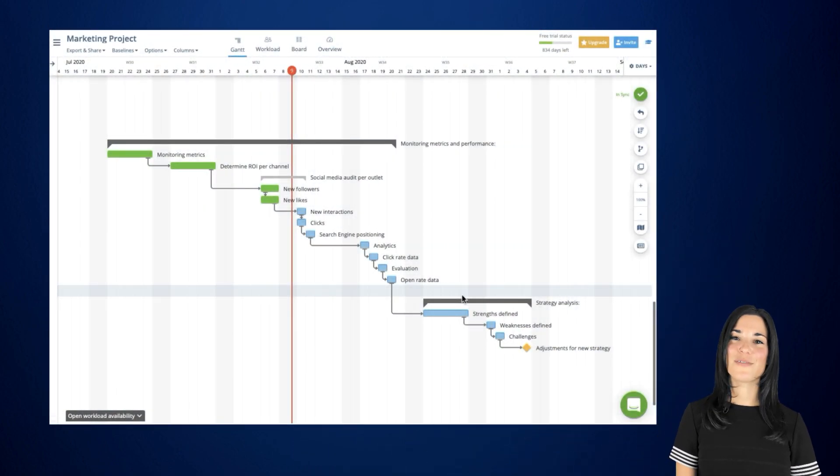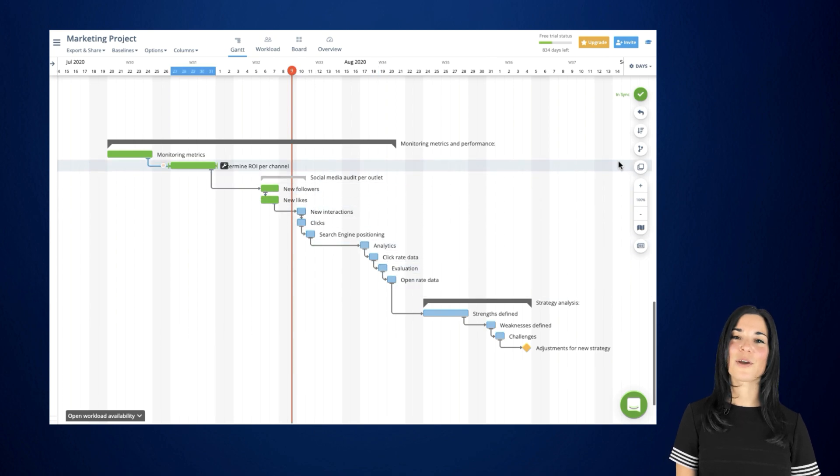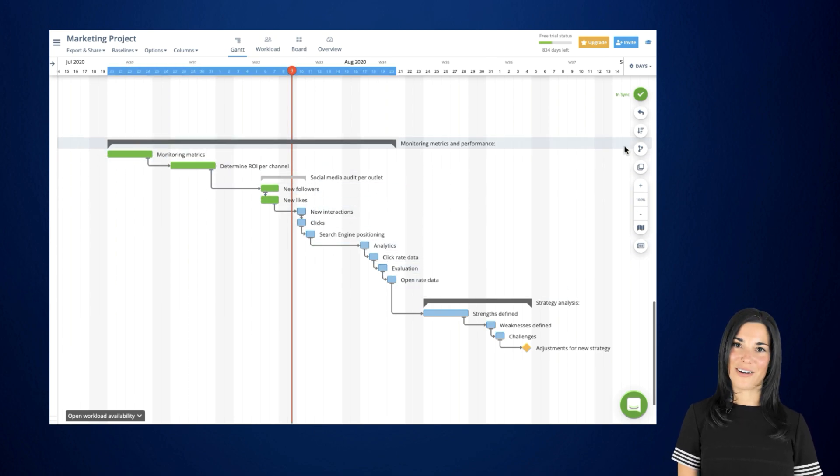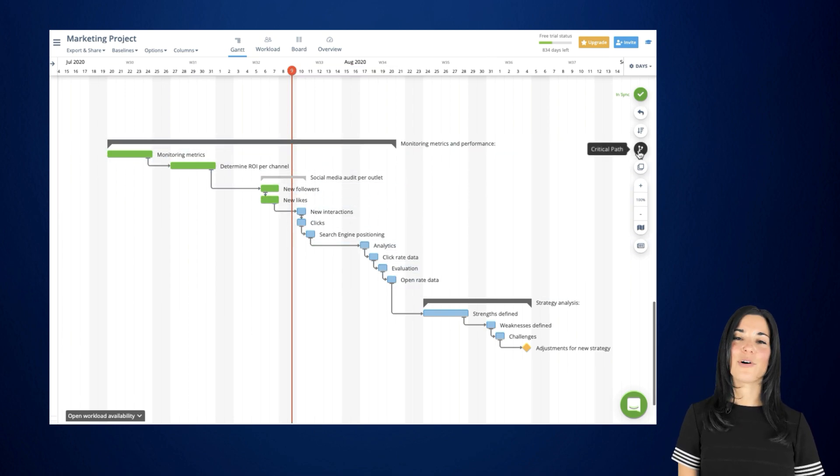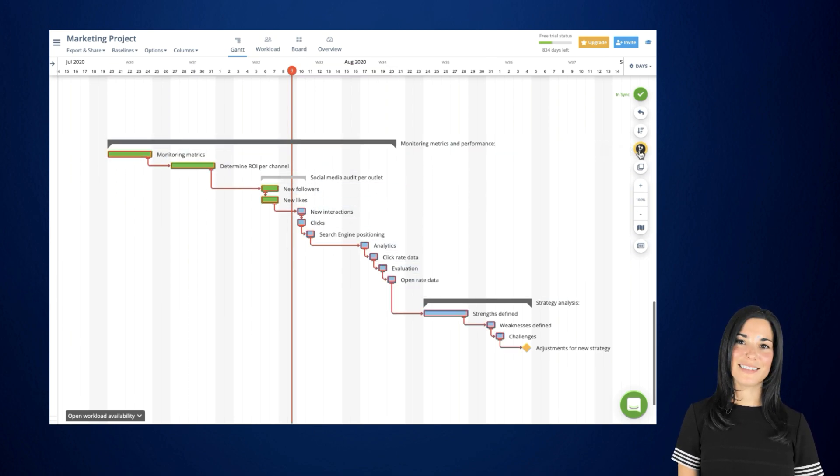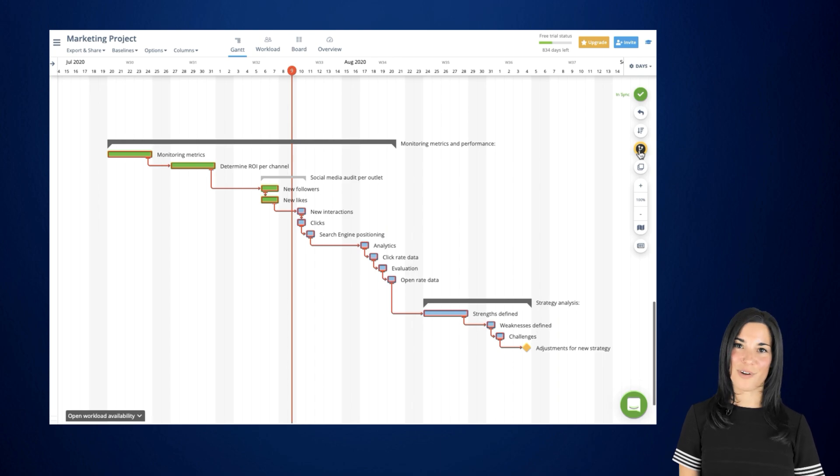To enable this feature, click on the critical path icon. It will automatically highlight the chain of dependent tasks that could affect the completion of your project.